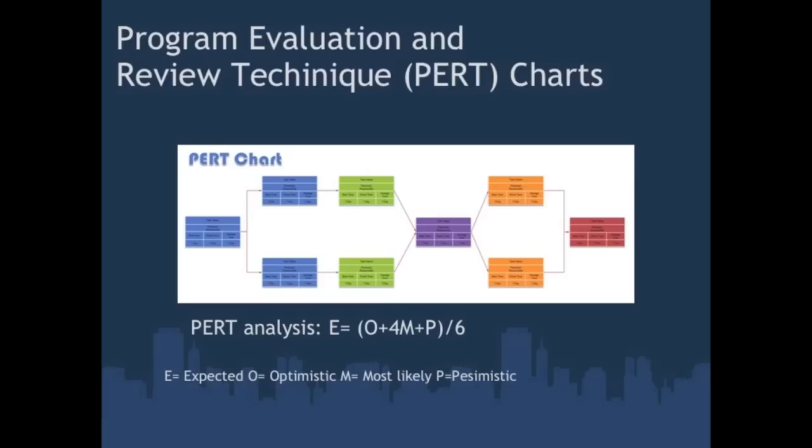PERT was developed primarily to simplify the planning and scheduling of large and complex projects. It was able to incorporate uncertainty by making it possible to schedule a project while not knowing precisely the details and durations of all the activities. It is more of an event-oriented technique rather than start and completion-oriented, and is used more in projects where time rather than cost is a major factor. It is applied to very large-scale, one-time, complex, non-routine infrastructure and research and development projects.